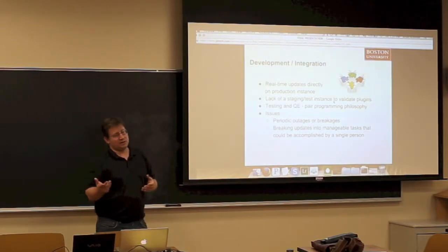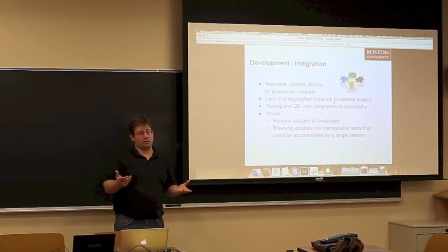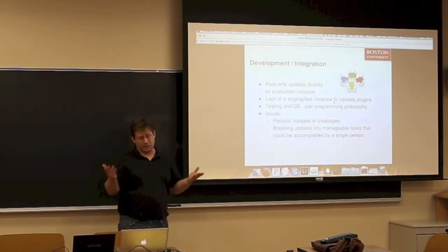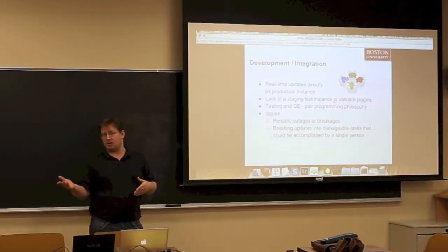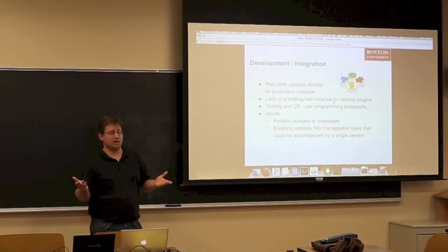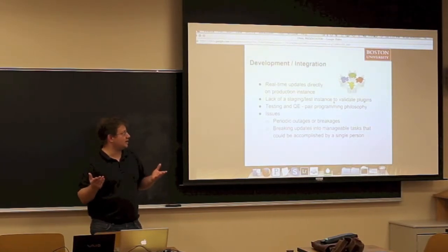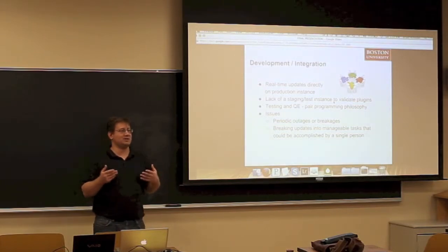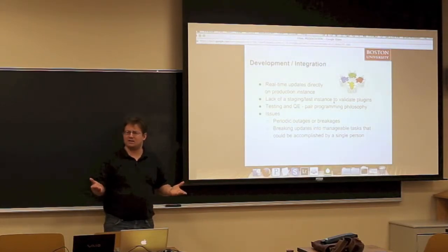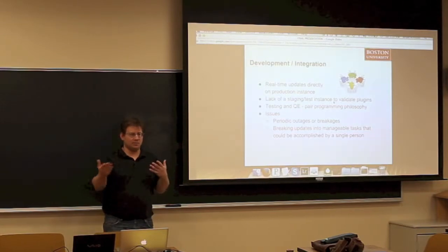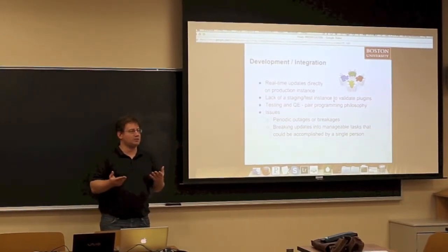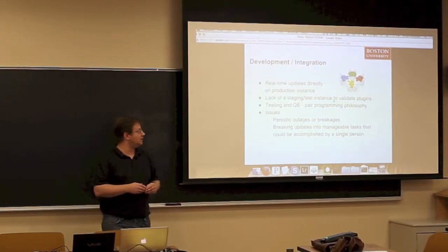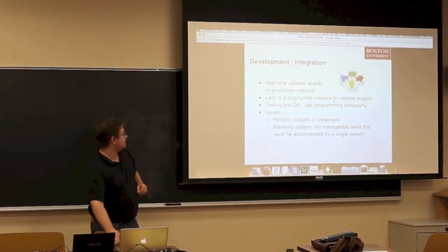The way we approached this, which I thought worked really well, is that we paired up. We didn't do pair programming, but each person was tasked with doing some set, and then another team member was tasked as the QE person for that. So it was kind of a pair programming philosophy, and it helped to solidify that there was continuity and standards, and you were forced to have another set of eyes analyzing your changes.